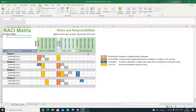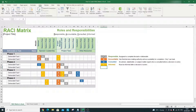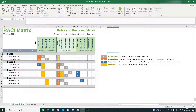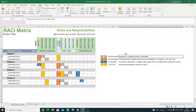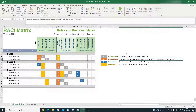There are four acronyms and each letter denotes a different role or responsibility. First we have R, which simply means Responsible — who is assigned to complete the task or deliverable. Next up we have A, which stands for Accountable — the person who will have the final decision-making on that specific task. They have the authority and accountability for the completion of that task.